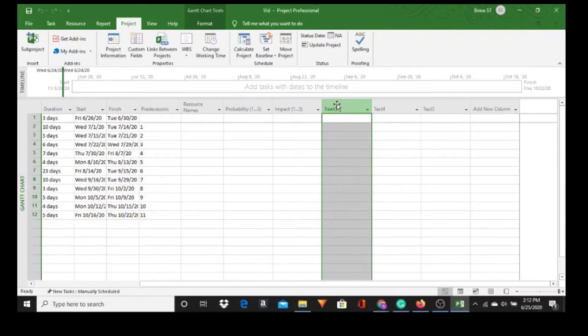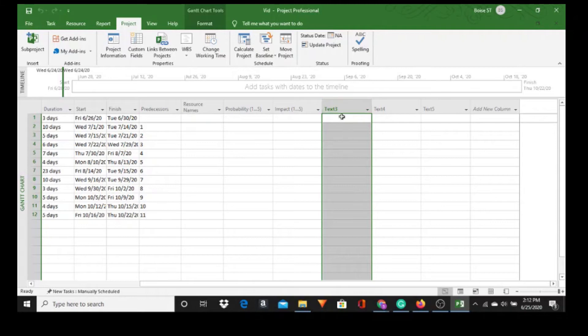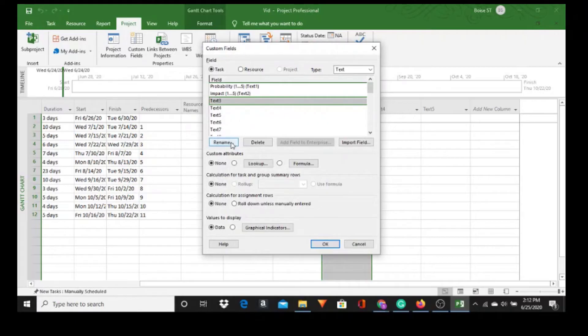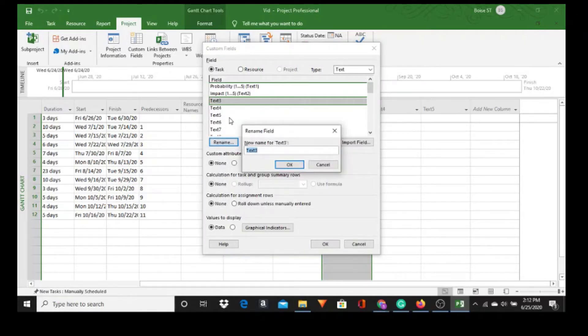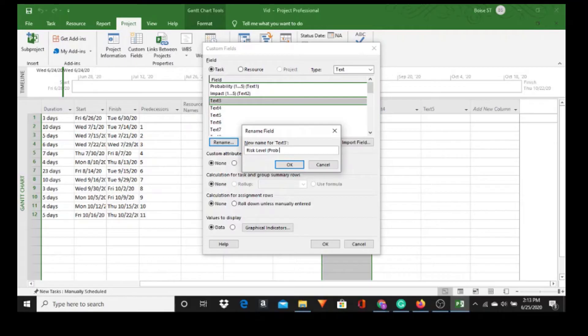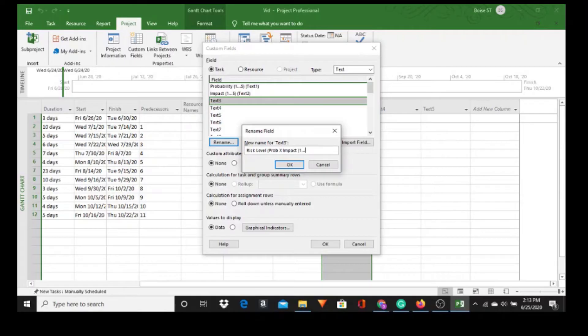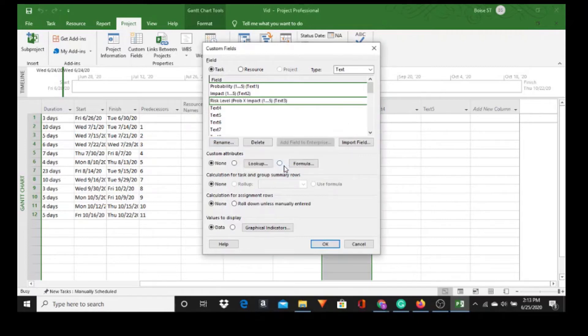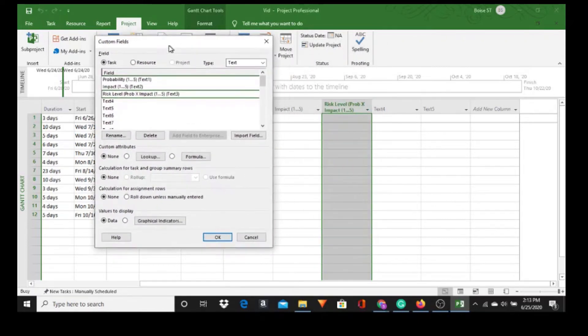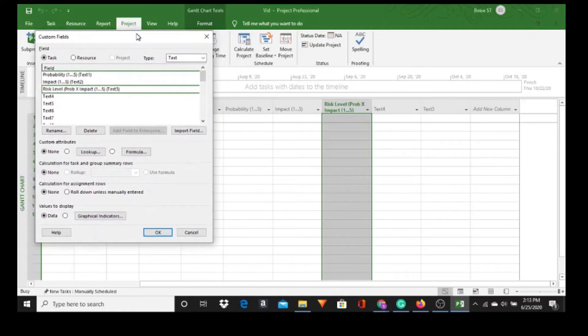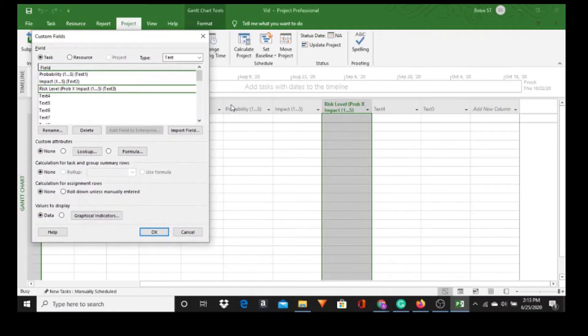Now Text 3, we're going to multiply Probability, whatever's in Probability, times whatever is in Impact. We're going to get the results here. To do that, we go to Custom Fields. I'm going to rename and call this Risk Level open parentheses Probability times Impact. But I want to put a formula in there because I want to multiply Probability times Impact. So let's put a formula in there.